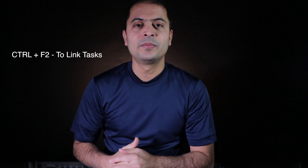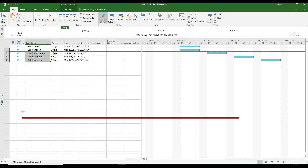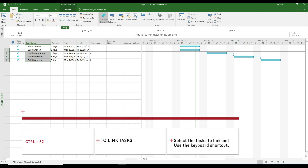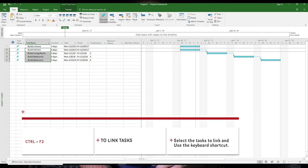The next shortcut I use most is Ctrl+F2 to link and Ctrl+Shift+F2 to unlink. Select the number of tasks that you want to link and simply press Ctrl+F2.